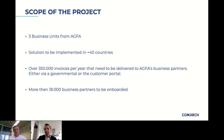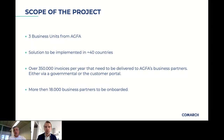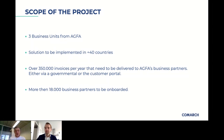We started under pressure with Italy, where new legislation forced us to move to e-invoicing for Italian customers. That was a proof of concept for us. We didn't have much time to think about all the aspects, but we managed to get Italian invoicing live in about two months, which was great. Meanwhile, Portugal — a smaller country in terms of business — also went live via the portal. Then we started looking at France, which is a bigger market for us, and France is also now live.